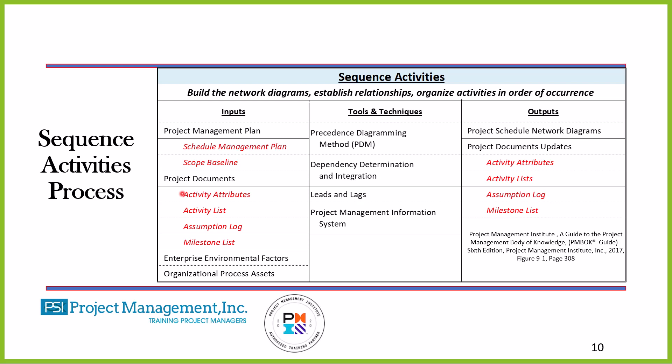Another important thing is the assumptions log — what are the assumptions I or my team have made regarding this project? Assumptions are things we believe to be true. The milestone list, if we have one at this point, would also be an input into Sequence Activities. The tool is Precedence Diagramming Method (PDM) — that's where we create our network diagram. The dependency determination covers mandatory, discretionary, and external. Leads and lags: if it's a lead, activity B starts before activity A is finished. If it's a lag, activity A finishes, no work is being done, then activity B starts.